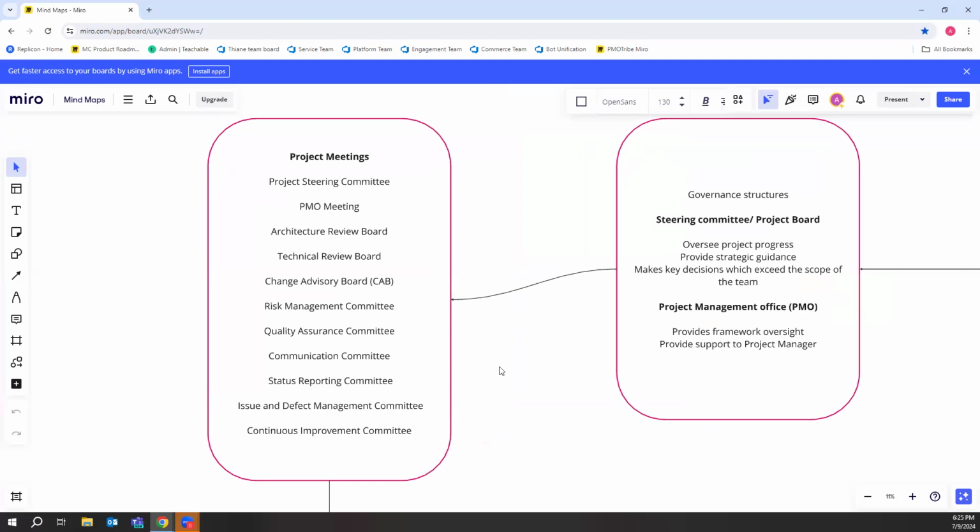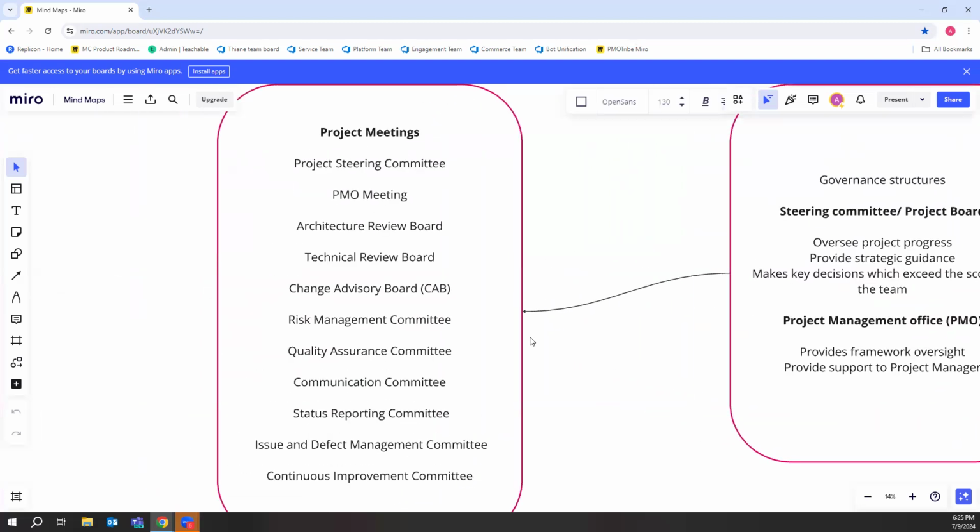Right. Then, important, the general project management meetings that you will be involved in, all right? The first one is the steerco. And this gives us a lot of anxiety as project managers. Generally they happen once a month. I don't know if you do it differently, if you have a different cadence, but generally once a month the stakeholders want to get together and get an understanding of where we are at, right? So the purpose of this session is to provide a high-level update. And in fact, I have a template.